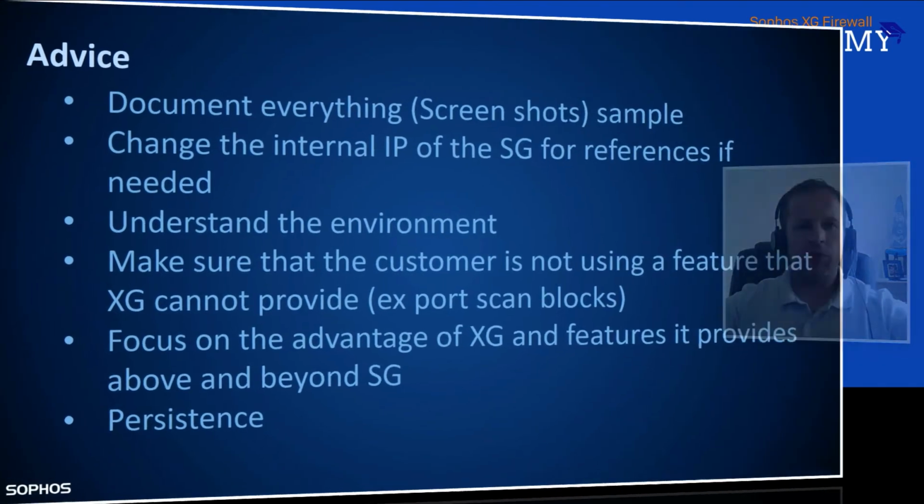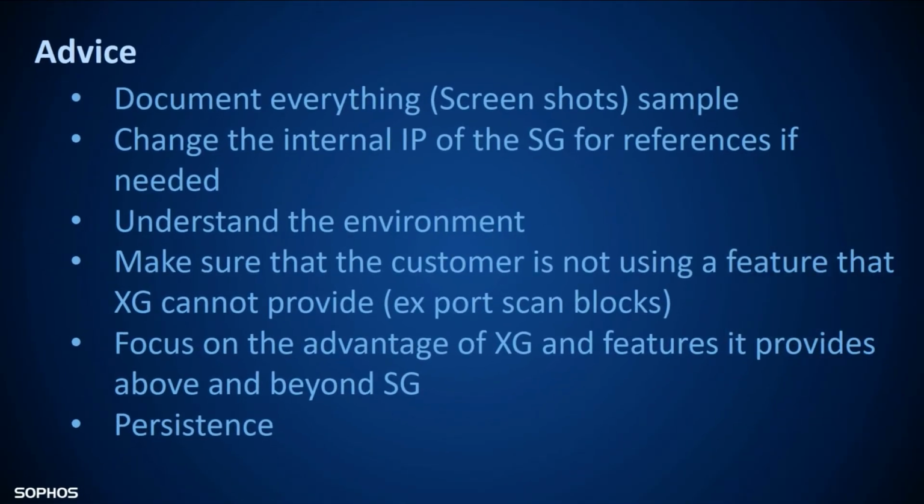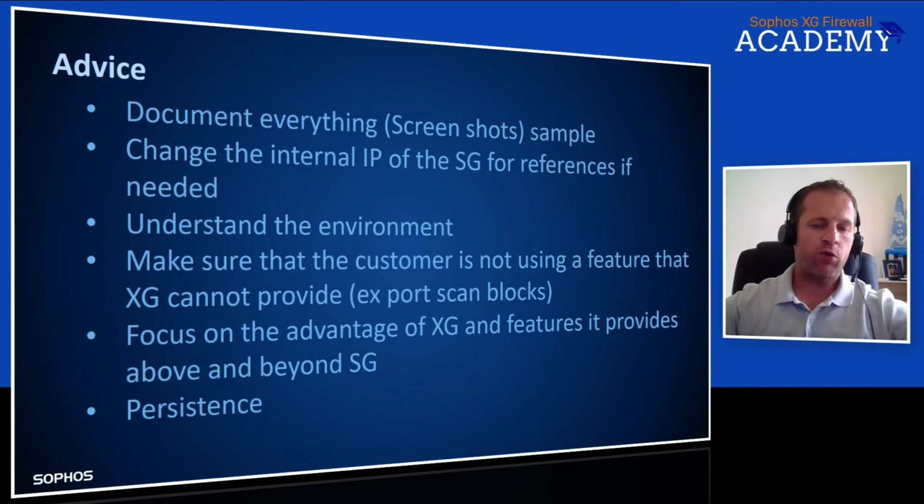Then some advice I could give you is document everything, take screenshots. I will show you something that I did for this customer. If you want to go ahead and take screenshots of the SG deployment, I think that really helped me, because the problem with this is we didn't want to change anything on the SG, so that if the change failed, we'd have to plug the SG back in. And therefore, we didn't want to change the IP address of the internal network to reference back to it. So once the change was successful, we actually changed the IP address of the SG so that we can use it offline and log on to it too.